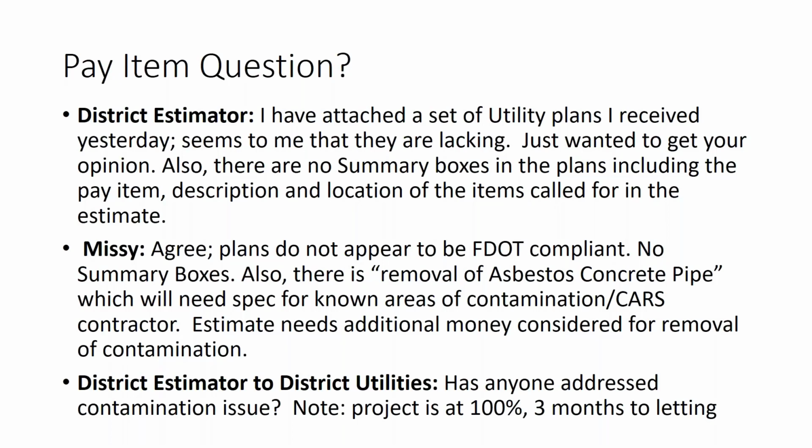Going back to the district estimator and the district utilities, they asked the question, has anyone addressed this contamination issue? Unfortunately not, but the project is at 100% plans and it's 3 months prior to the letting. So what they thought was a simple pay item question, whether the summary box was complete, turned out that they had missed a critical step early in their plans development process. So always be mindful that while you may ask a pay item question, it may not always be a pay item answer to your issue.